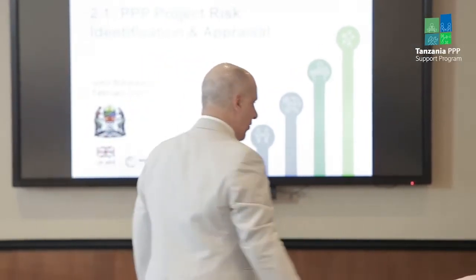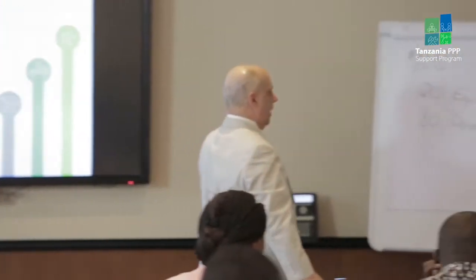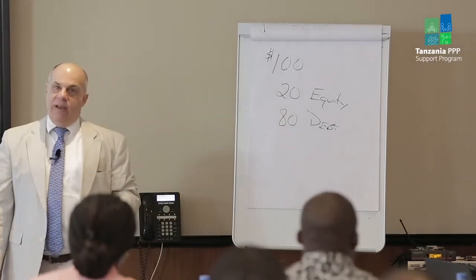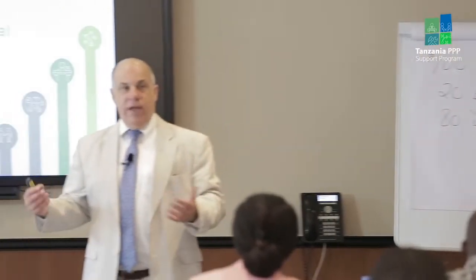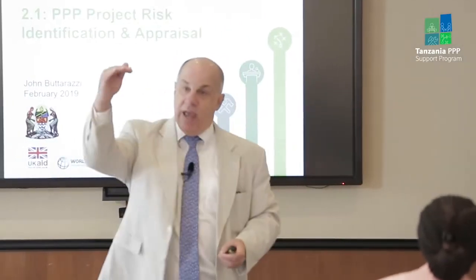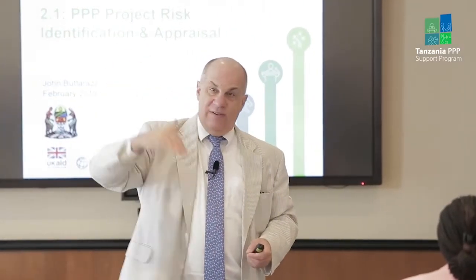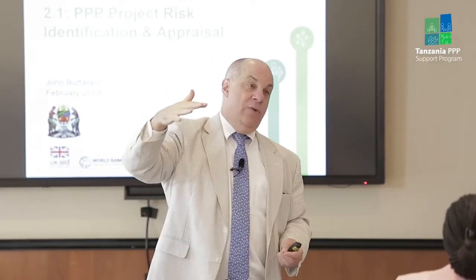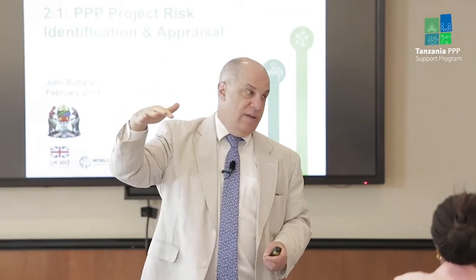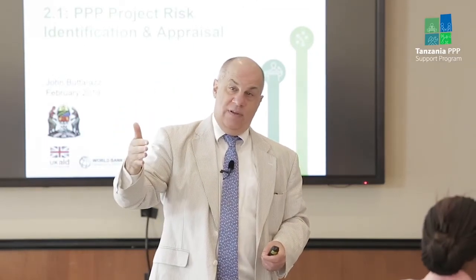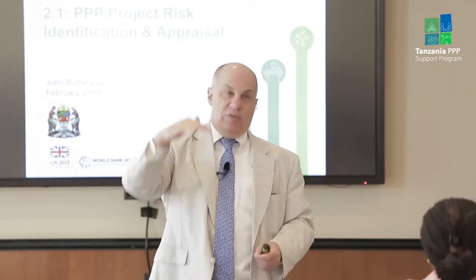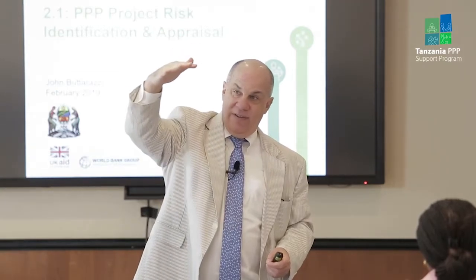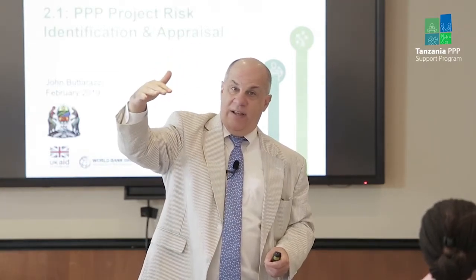One of the things you will also learn, Ned covered this, and you'll see it more in action: it's difficult to borrow 100%. Part of it is risk, but also we have something called the debt service coverage ratio. The bank wants to be protected. They're worried about their money, so they want to make sure the private party has enough cash flow to not just make their debt service, but there's a cushion, a safety buffer, so that there's always going to be enough money to do that.